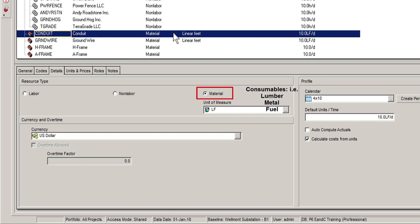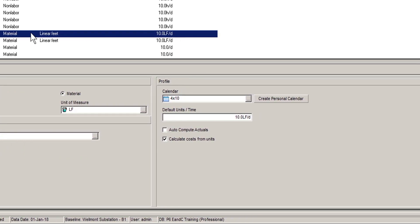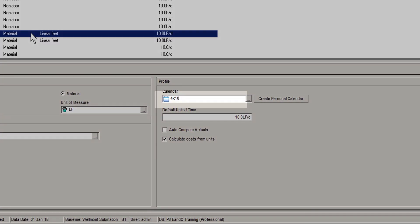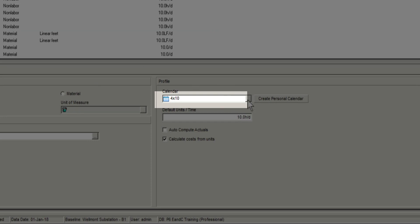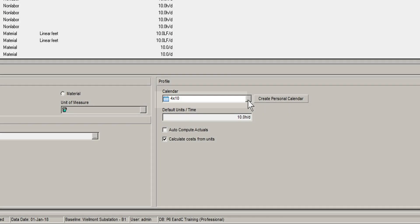You can also assign a calendar to a resource. This controls when the resource is available for work. This typically most applies to labour resources.